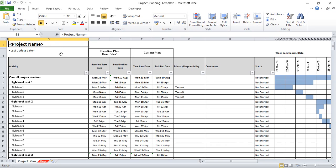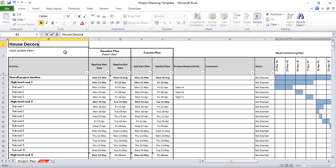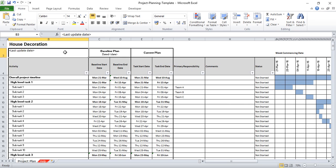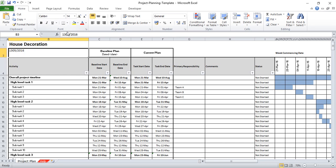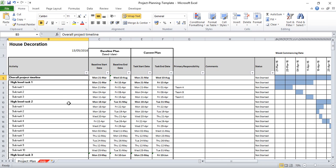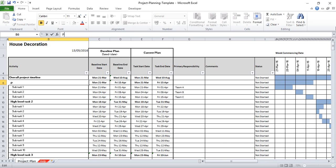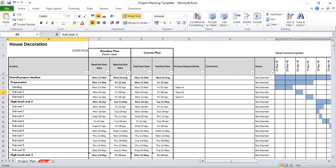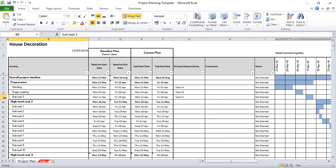So how to use this template. Firstly, you need to put in your project name. I am trying to plan out my house decoration, so I'm going to call it house decoration and today's date is the 13th of May 2016. I need to think about some of the tasks that I'm planning. So the first thing for any house decoration is about preparation, so I need to do some sanding and some sugar soaping.